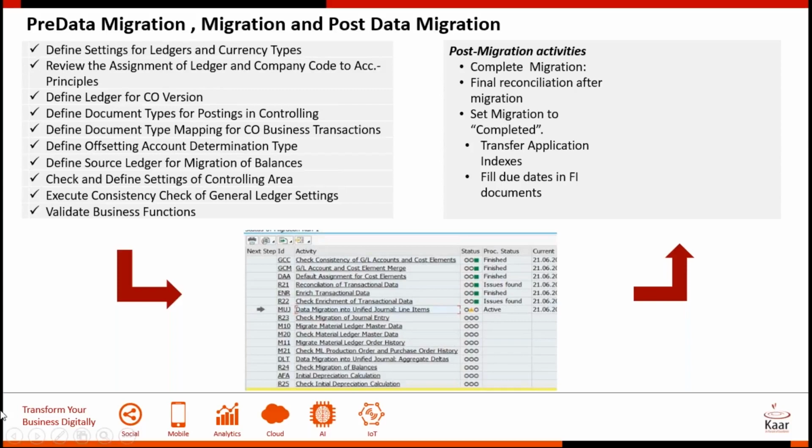There are some issues that happen during data migration where you could fix them after you go live, depending on the complexity. But there are some where it does not allow you to move forward. And some of these are really long running jobs. So this process could even take as much time as your actual SUM downtime. So you'll have to rerun this multiple times to ensure that you get this within the cutover window. And then you have some post-migration activities as well. But all this is done through ABAP reports from your GUI screen, as you're already on the S4 system.